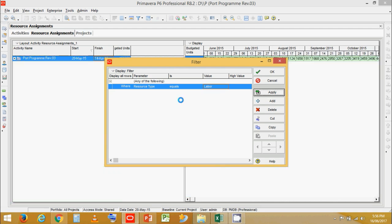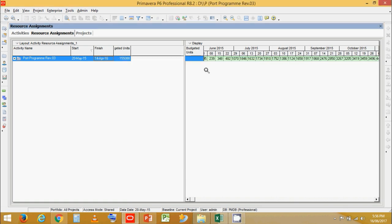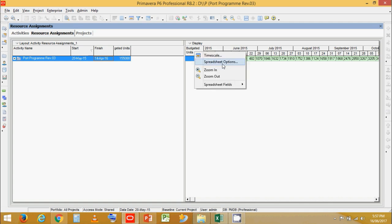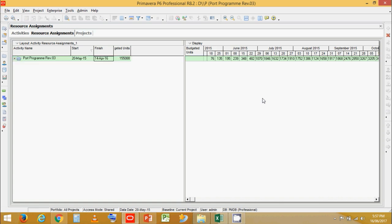If you remember, the definition of an S-Curve is that it is cumulative labor or cumulative cost plotted against time. Let's click OK. Now here we have the spreadsheet field — we have selected Budget Units, and this is the time scale for the project. Right-click, go to Spreadsheet Field, and click on Budget Units to get a time scale as budget units.